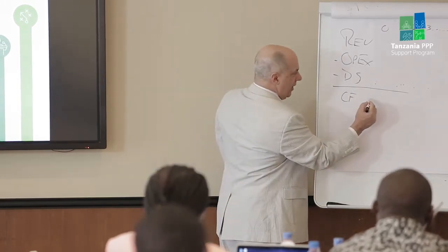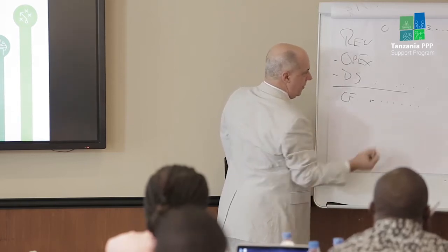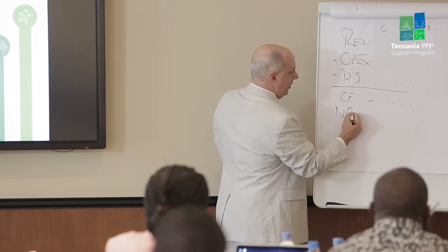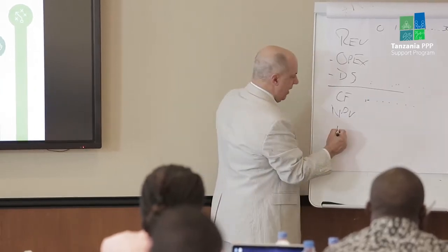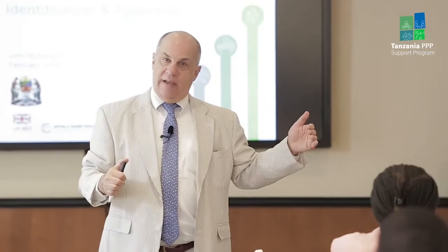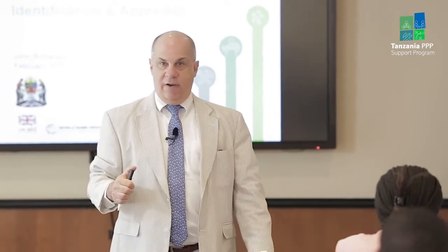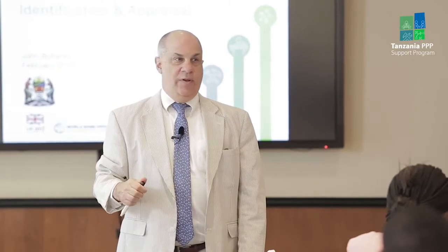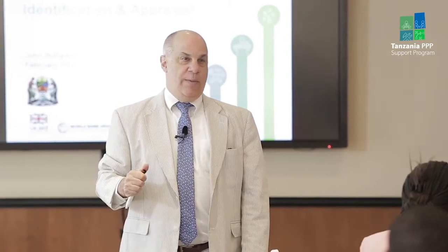Well, we have our cash flows down here, and you're going to calculate net present value, and you're going to calculate IRR. If our cash flows are high, net present value is higher. If they're low, NPV is lower, same goes with IRR. So the interest rate for the bank loan impacts cash flows, which impacts NPV, which impacts IRR. Pretty much that straightforward. Other questions or comments?